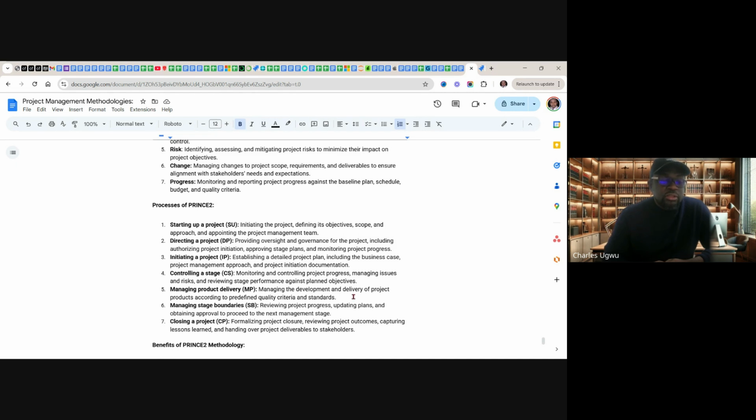Closing a project, formalizing closure, reviewing project documents and capturing lessons learned, and handing over project deliverables to stakeholders. And that is PRINCE2 for you.